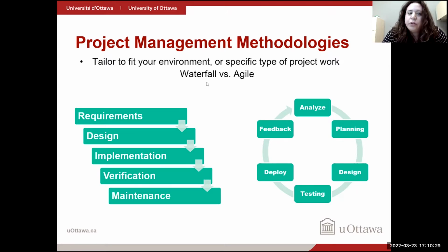No matter what approach you choose, you want to consider the environment, how simple or complex you are, and how involved your key stakeholders can be or are willing to be. So just to go into detail about the pros and cons of each of these two methods, I would say waterfall is really great if you are in an industry where there's lots of regulation and you're going to have to compile a lot of documentation, because the planning phase is quite intense up front.